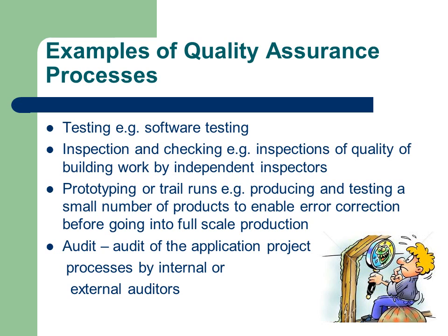Prototyping or trial runs. This quality assurance process is used in industries such as manufacturing and software development, where a small number of products are produced and tested prior to launching into full production and rollout. This approach is more cost effective as any errors or defects to be fixed will only need to be applied to a small number of units.